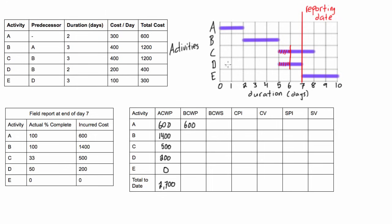Activity B is also 100% complete and we budgeted $1,200 for it, so BCWP is $1,200. Activity C is 33% complete and we expected the total cost to be $1,200, or $400 per day. Since we only completed one day's worth of work, the budgeted cost of the work performed is $400.